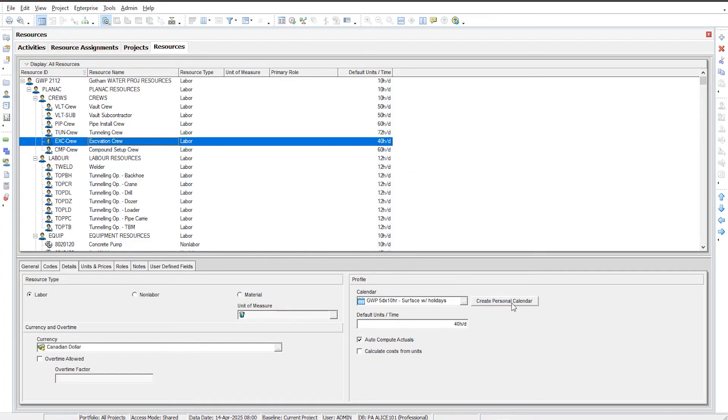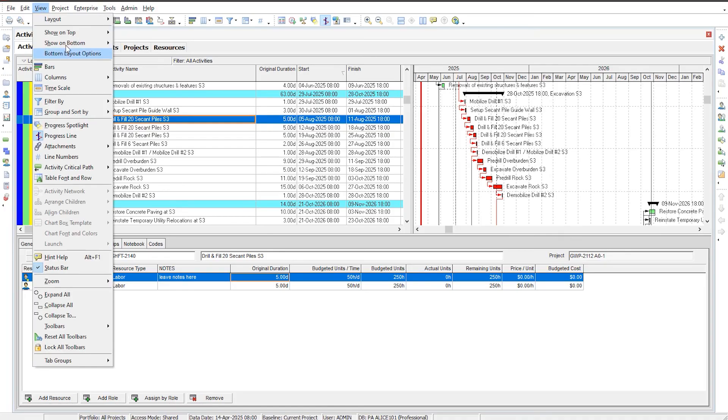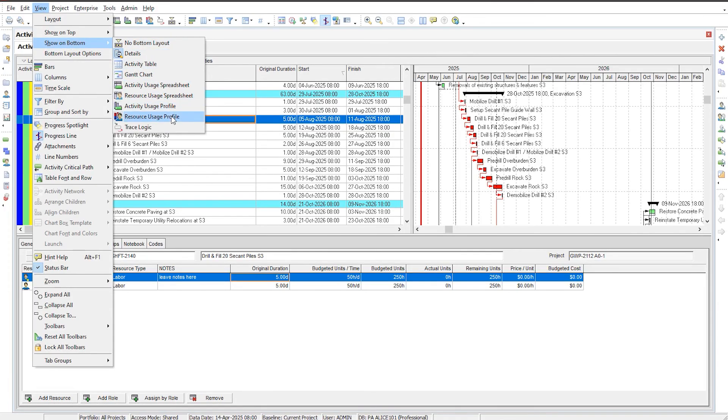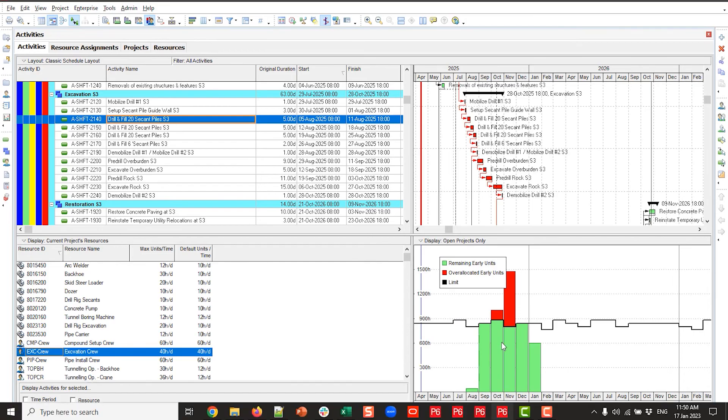Do not create personal calendars. Why? Personal calendars on resources will affect all sorts of things. Your activities will still be scheduled properly according to the activity calendar, but when you get to looking at graphs — using the resource usage profile — your graphs will be affected by any personal calendars. And if they do not match the way the activity calendar is set up, you're going to be in a world of pain and confusion. Calendars are king in Primavera P6. Make sure they are consistent — assigned to your resources and matching the calendars assigned to your activities.